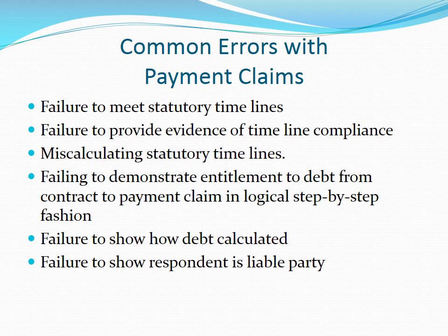Some of the most common errors people make with payment claims is failing to meet statutory timelines, failure to provide evidence of timeline compliance, miscalculating the statutory timelines. One of the timelines being, for example, the reference date, the date on which you're entitled to send out the payment claim, whether it be under the contract or whether it be under the Act.